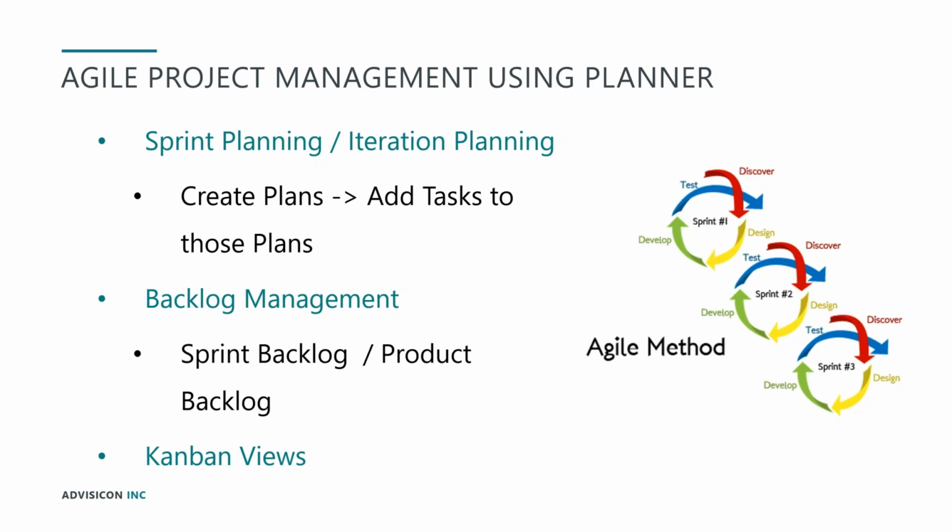It allows you to engage in the sprint planning process. You can have one bucket that holds all my backlog or to-do items. You can then have sprint one, so you can easily see what's going to be included in the development tasks in my first sprint, and then sprint two, or sprint three, and so on and so forth. So you can have your sprint backlog and your product backlog, with all those various buckets. We'll go through how that looks and how to add that.